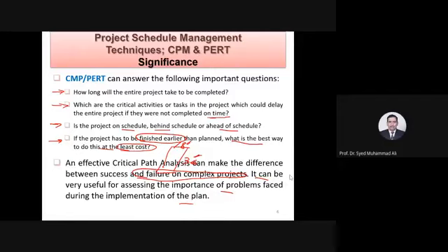Now the first thing is to meet the specifications. Who is the supplier? What is their product and what is their cost? When the cement is required, you have limited space for storage. So just imagine only these 3 materials to be ordered, brought to the site and stored properly, and make sure that they are according to specification. Otherwise, your bill will be rejected.